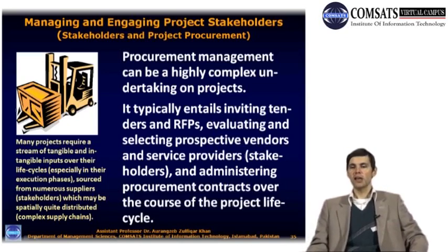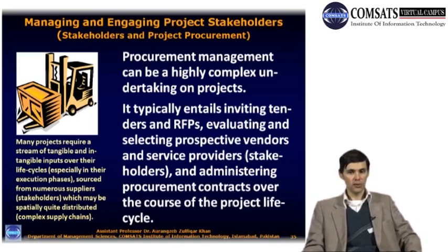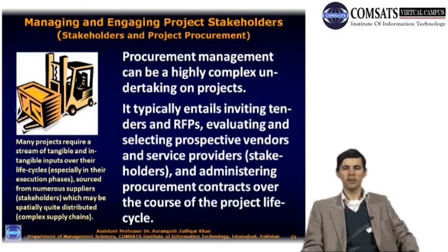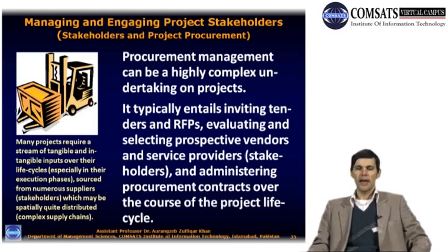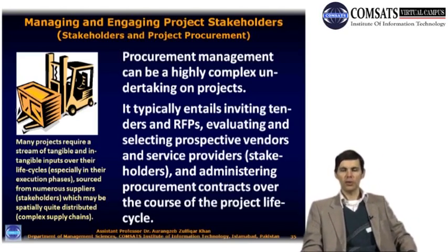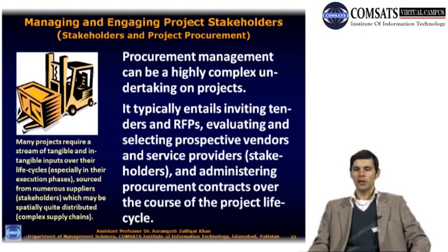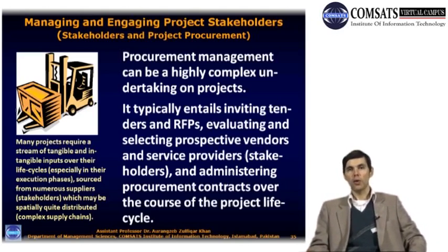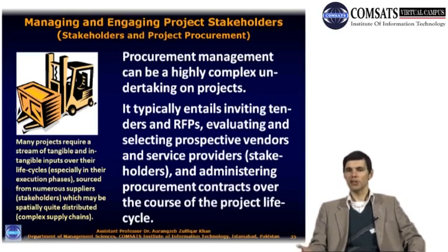Procurement management typically entails inviting tenders and requests for proposals, evaluating and selecting prospective vendors and service providers, and administering procurement contracts over the course of the project life cycle. Well, again, this is all stakeholder related. You evaluate your vendors. Who are vendors? They are stakeholders. And you have to see that they are delivering according to required specifications. You evaluate requests for proposals from service providers, for instance, from consultants. All this comes under procurement. All these are stakeholders.